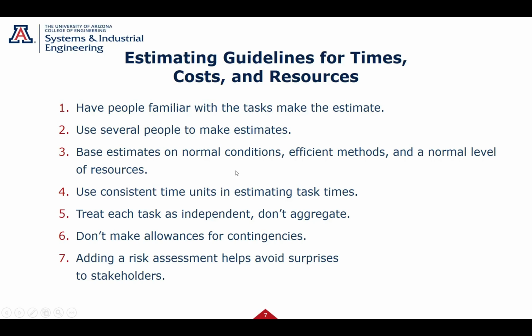You want to base your estimate on normal conditions, normal level of resources. We are going to pad that estimate later, but that pad could cost you the program. You want to bid it the normal way, and then you and management can decide what to pad later on. Use consistent time limits. Everybody should be doing months, days, weeks, or hours, whatever you want to do, to be consistent. Treat each task as independent.